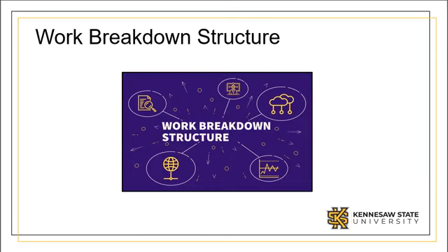Work breakdown structure is a detailed plan which expands the project into a detailed listing of activities. Project tasks are broken down into finer elements until a specific responsible party is identified. Work breakdown structures promote accountability and transparency. This allows elements to be situated in parallel as opposed to series as you would see at the activity level. This also enables project managers to accomplish more with fewer multifunctional resources.